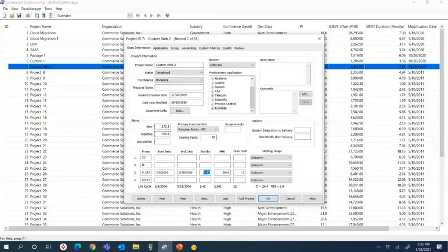We want to capture how much time and how much effort and how much work, and then we can calculate that productivity index that I mentioned, which in essence is a macro level measure for productivity and efficiency. And it takes into account the overall project environment, right? Things like tools and methods you might be using, experience level of the people that are on the team, complexity of the software that you're delivering, things like that.